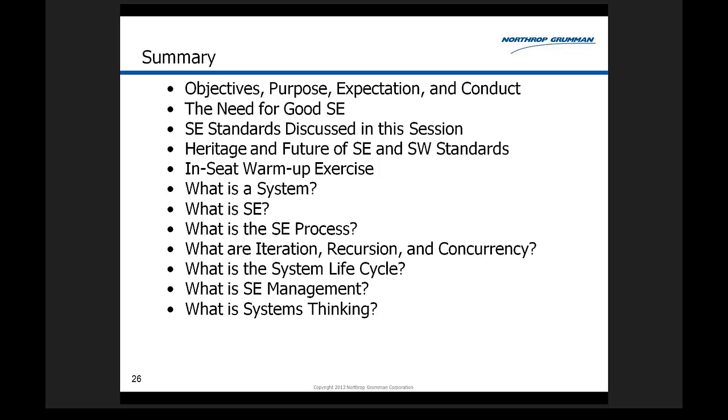But Agile is so different that you need to make sure that the teams are all trained and your hierarchy is trained and they all become stakeholders and buy into the process, because it's a very, very effective process, mostly effective when requirements are highly volatile. If the requirements are highly changing and the customer or the user really doesn't know what they want until they see it, and they're going to be part of the team and be evolving with you as you go, Agile will work in a high requirements volatility situation.